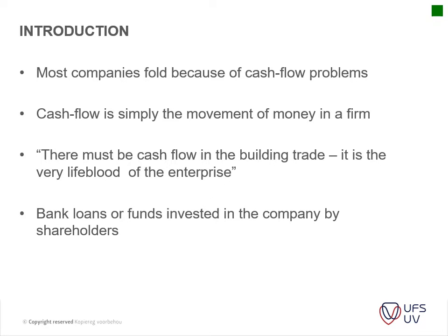Okay, bank loans or funds invested in a company by the shareholders. The client can also run into financial difficulty, and that's something that one should also consider. So it's always worthwhile to make sure that the contract that you've been appointed for, that the client actually has the necessary funds available to pay you in the end, and pay you timeously. That's the main thing. Sometimes the client doesn't have money, and then they only pay you after 90 or 120 days, which will have an extra effect on your cash flow.